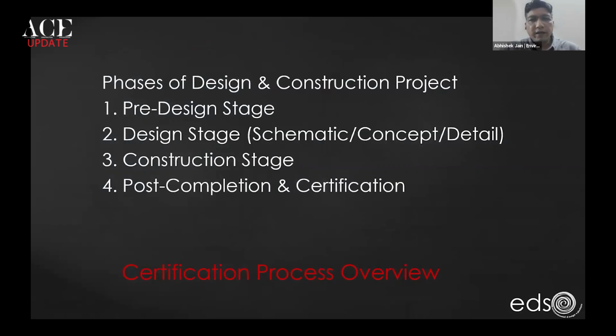So when we look at any construction project, key design decisions are broadly taken at four major stages. First is the pre-design stage. Then the second is the design stage, which includes stages like schematic design, concept design, detailed design. Followed by this is the tendering, BOQ, and the construction stage. And after that, post-completion and certification of the selected rating program is taken up.